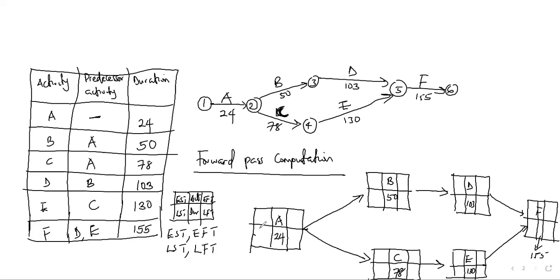What is the earliest start time at the beginning of the activity? Zero — it is zero. Thank you. So we are moving in the forward direction. We are going to add the earliest start time plus the duration to give us the earliest finish time. For A it is zero plus 24, which gives us 24. Because B and C are both attached to A.